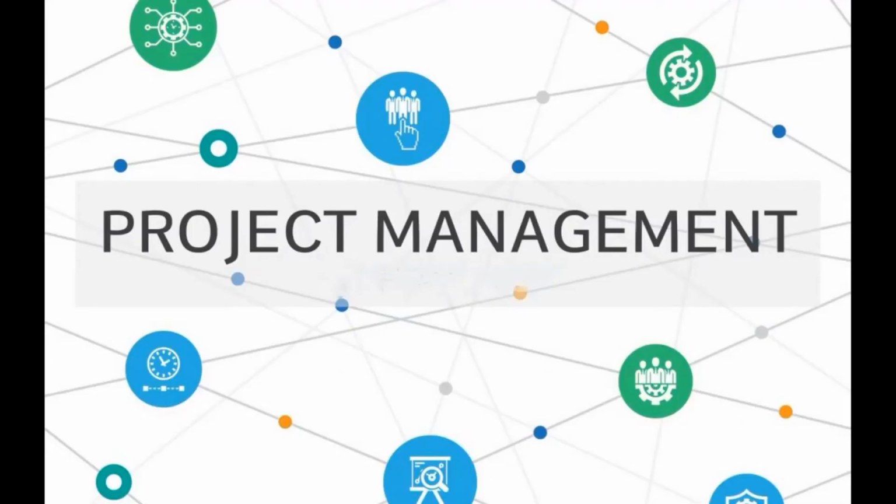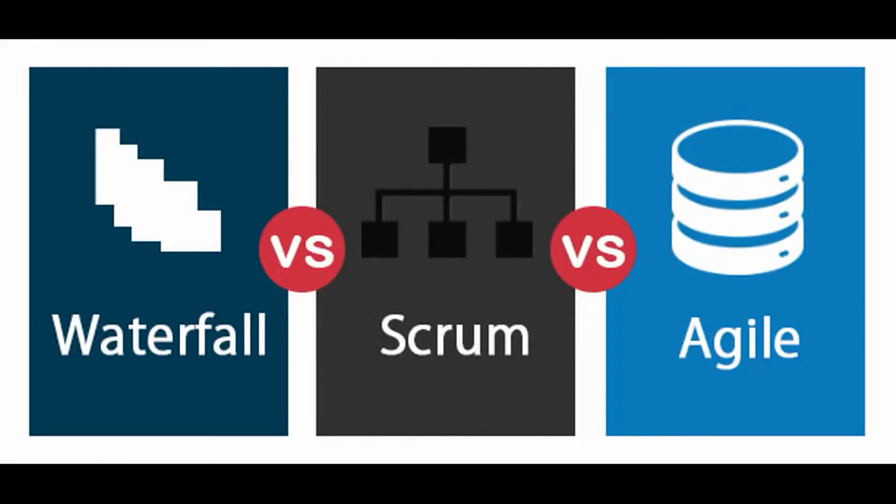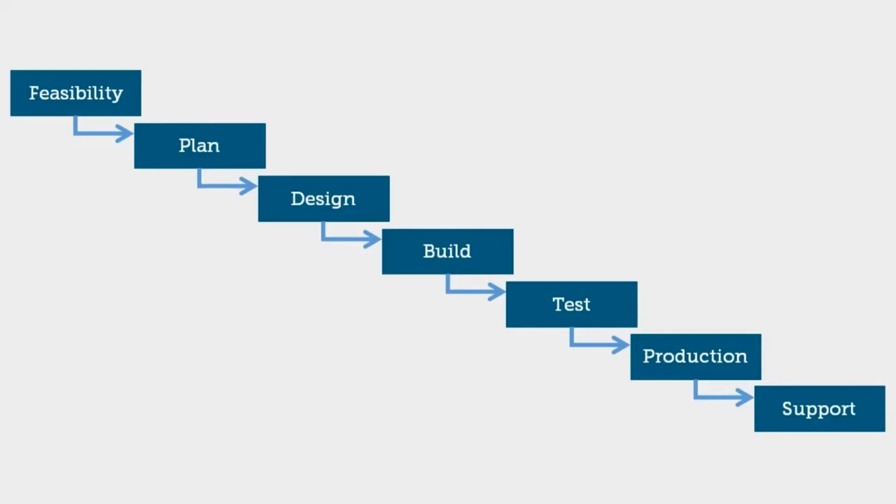There are 2 major ways these projects are typically run in an IT department: the waterfall and Scrum methods. Waterfall, a traditional approach to project management, requires you to gather and build the entire feature set up front with deadlines and an expected completion date and cost.